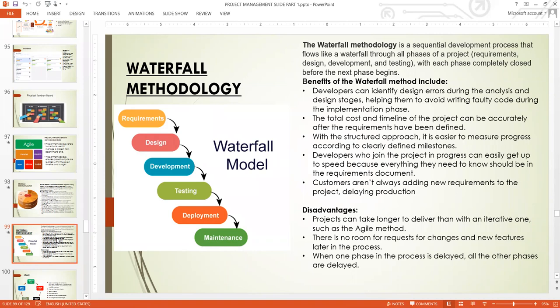That is one good thing about Waterfall — because you finish the whole design and analysis first, you know how much it is going to cost from the requirements stage. In Agile, you cannot know exactly how much it's going to cost because Agile is so flexible and so much dependent on what customers want.